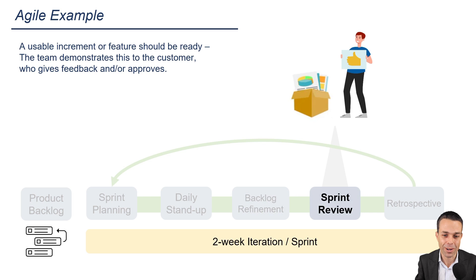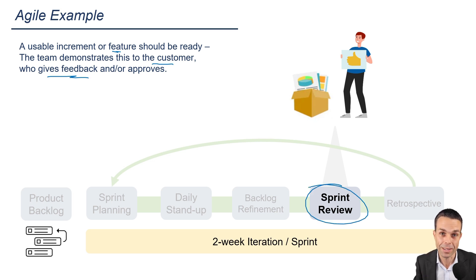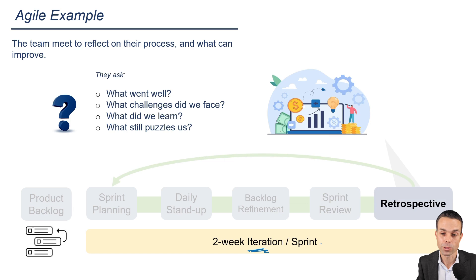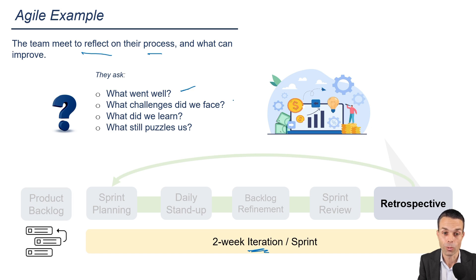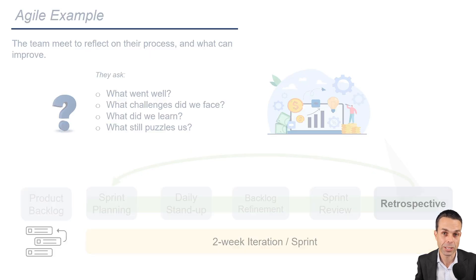During our iteration, we've worked hard and completed something we can actually show to the customer — a usable increment or usable feature. The customer reviews it, gives their feedback, and approves it, or maybe we need to do a little more work. All of this is done during the iteration review or sprint review. Then at the end of the iteration, we review our way of working as a team during the retrospective: what went well, what didn't go well, what should we improve, what did we learn, and what still puzzles us? We take those improvements and make sure they happen for the next iteration, so we're always continuously improving.